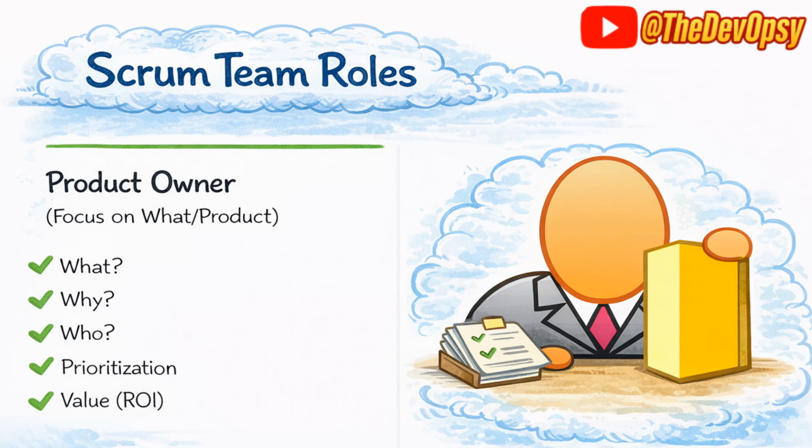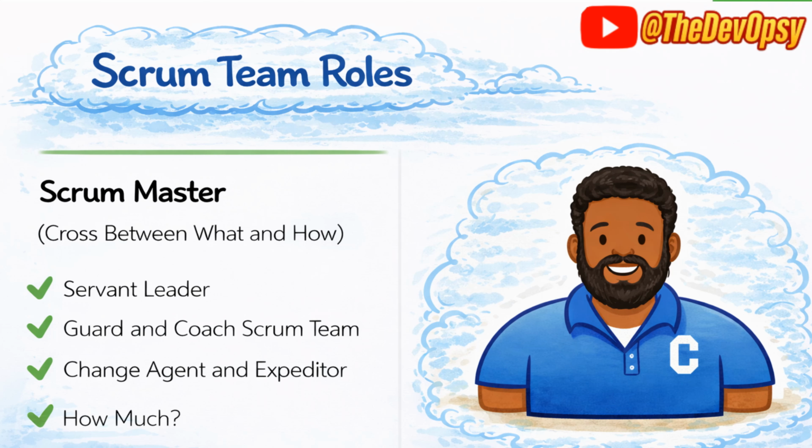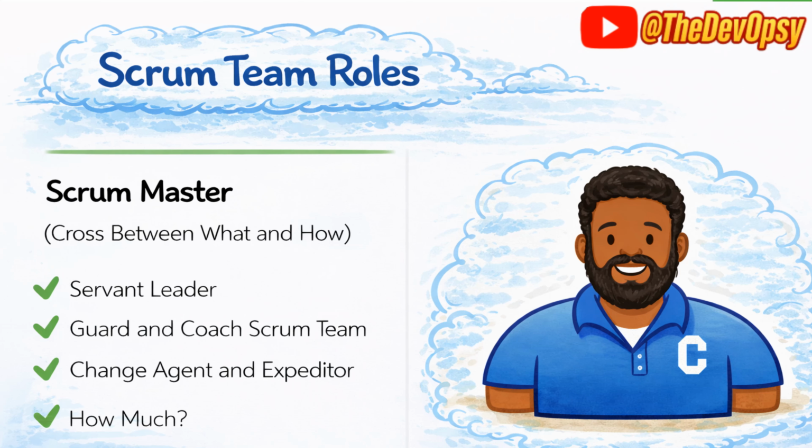Then comes the Scrum Master. The Scrum Master guides the Scrum team and protects it from external requests and disruptions. Now we will not take any change. If there is any change, go to the PO and put in a requisition. The PO will add that item to the sprint backlog and prioritize it.